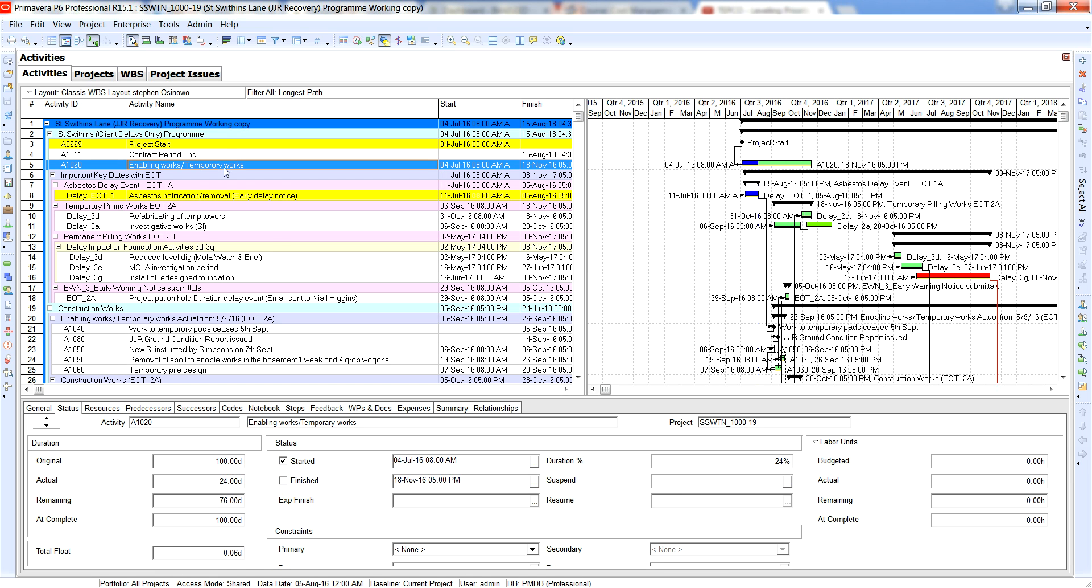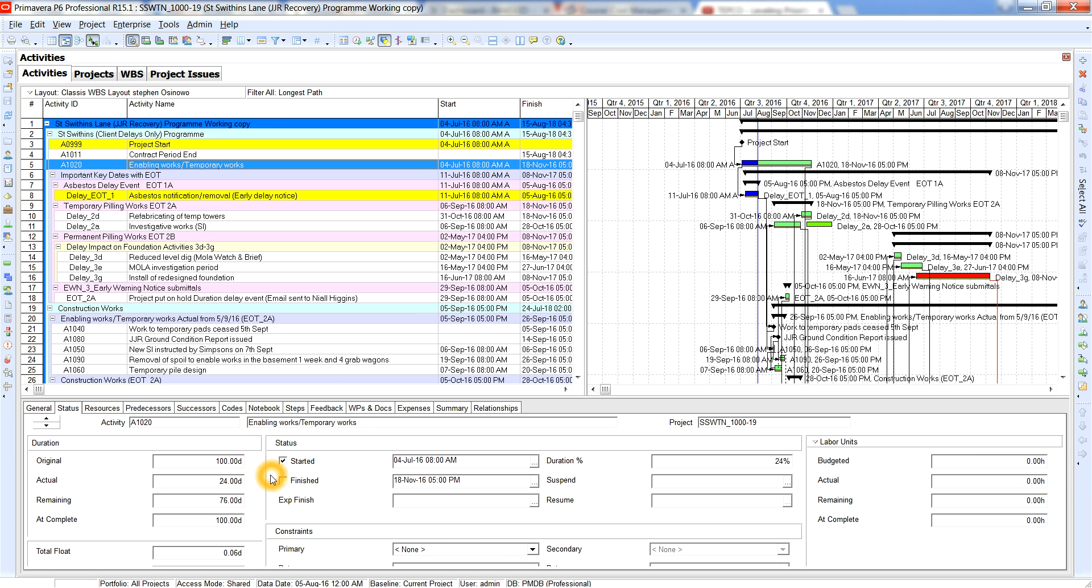Now if you look over here you've got the original duration, you've got the actual which is 24 and then you've got the remaining 76. So in essence what that means is based on the data date that we input, everything's progressed as planned in terms of duration percent complete and we've got 76 days remaining and that completion would be 100 days assuming that everything progresses as planned.